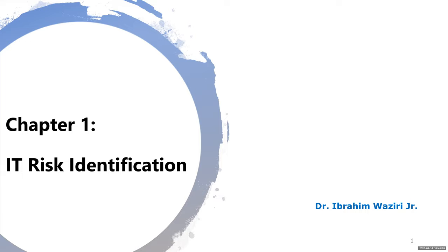If I could just add something, Dr. Waziri, Jacob here. Just adding to what was just said, I think it is probably very difficult for us to eliminate all the risks. So we probably want to identify them all and then be able to weigh them against the consequences or the damage that may result from them, and then prioritize them by aligning our resources against them.